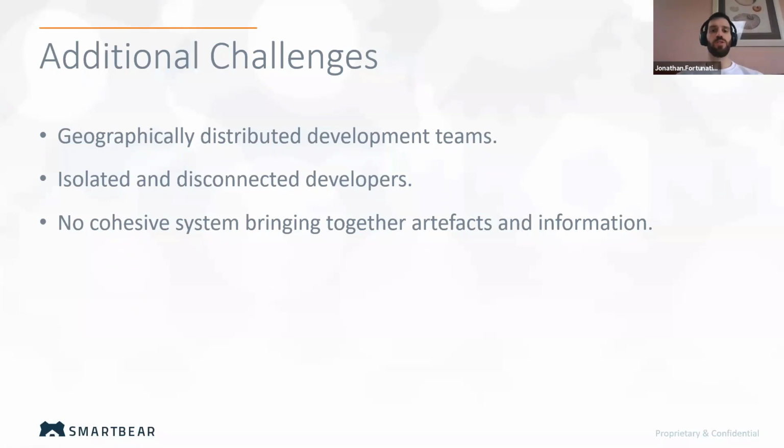So not just the code, but you have all your tests, and are all your tests passing? Do you have all your updates to your documentation? Has your product person looked over the code to make sure that the requirements are actually being met? Having that checkpoint before you call something done can be super helpful for your team. It's going to help reduce technical debt.